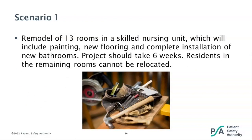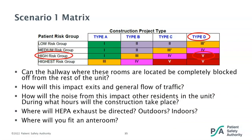We'll now run through some scenarios to show real-world examples of how to apply the ICRA 2.0 tool. In our first scenario, we have the remodel of 13 rooms in a skilled nursing unit, which will include painting, new flooring, and complete installation of new bathrooms. The project should take six weeks. Residents in the remaining rooms cannot be relocated and will remain in the unit. Key points here are multiple rooms being remodeled for an extended period of time, and residents within the same unit will not be relocated. This would be classified as Type D, with major demolition and construction activities taking place in two or more rooms, in a resident care area — making our risk group high risk. With this information, we know this project requires Class V precautions.